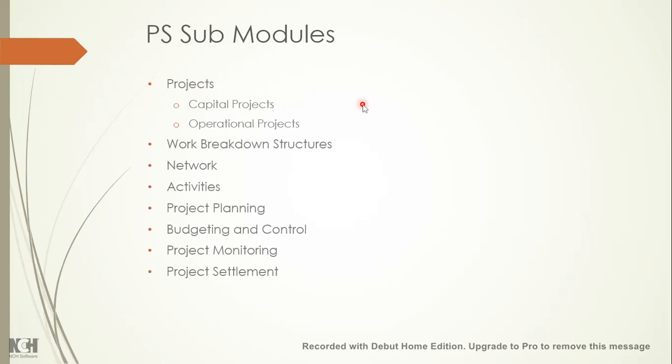Project systems helps you to not only control your project budget but also to monitor each stage of the build of that plant. It uses these different elements which you need to learn. Work breakdown structures, in short, are called WBS elements. So project is the highest node. Below that, it is called a WBS element.